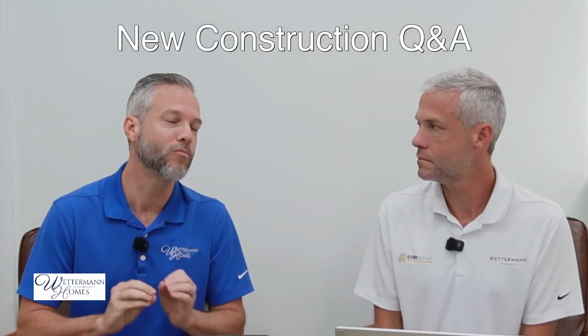Once you get into that realm, as Kurt mentioned, there are certain things as far as parking, and we started delving into this. Seminole County was very responsive. They outlined everything and were very communicative, and parking is a major thing. If anybody wants to use a residential site for some type of business operation where people are coming to the site, parking may be your biggest challenge, because that's not something we can engineer into the plans, and that's what we found out with this one. And so they ultimately said they wouldn't approve what they would call a special use permit.